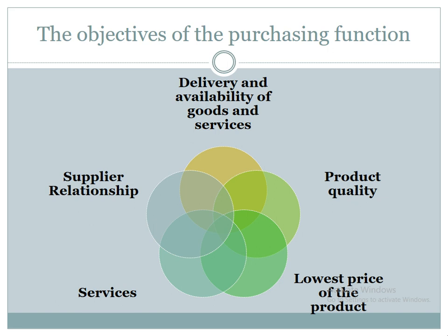So next time after this evaluation is made, when they have some orders, they will ask for a quotation from each and every vendor. Now, if two 5-star vendors and one 4-star vendor agree for that delivery, then first priority should be given to 5-star vendors. So this is the use of vendor evaluation.